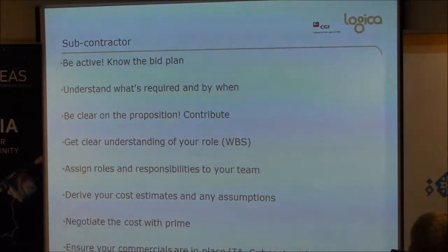Start doing your cost estimates early. Don't leave that. Start writing the technical solution. Usually, the first thing the technical guys do is they're off writing the proposal before you've even started. The first thing you do is start to get the price calculated, because you're going to need to figure out, can you do this, and what cost it's going to be.